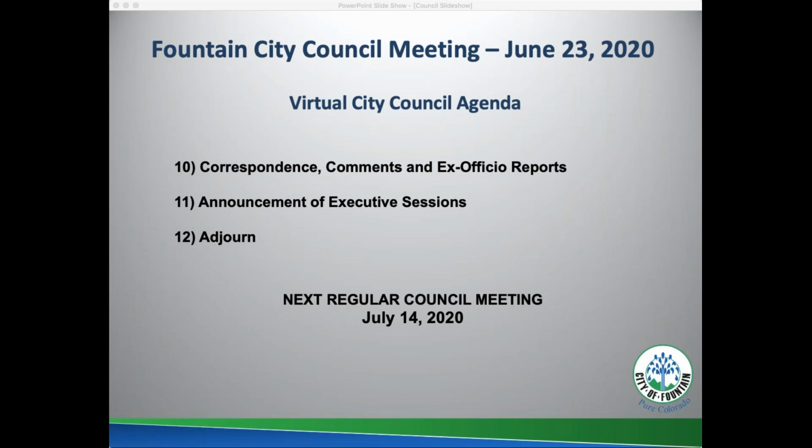Oh, and then I'm just going to keep going with that. So Todd, if you need to jump in on that, starting, I think I heard today, next week, the CNS and Link intersection is going to be, I don't think it's closing fully, but all the detours and things are going to be in place as they start working on the intersection there. They're going to be adding concrete instead of asphalt right at the intersection itself. And then once it's all said and done, we'll also have the lights that everyone's been asking for. There are no roundabouts. The picture that was online, that's not the final configuration. The picture was to show what the detours and everything is going to look like during construction, which we're expecting to last around, I think, 6 weeks to probably 2 months.